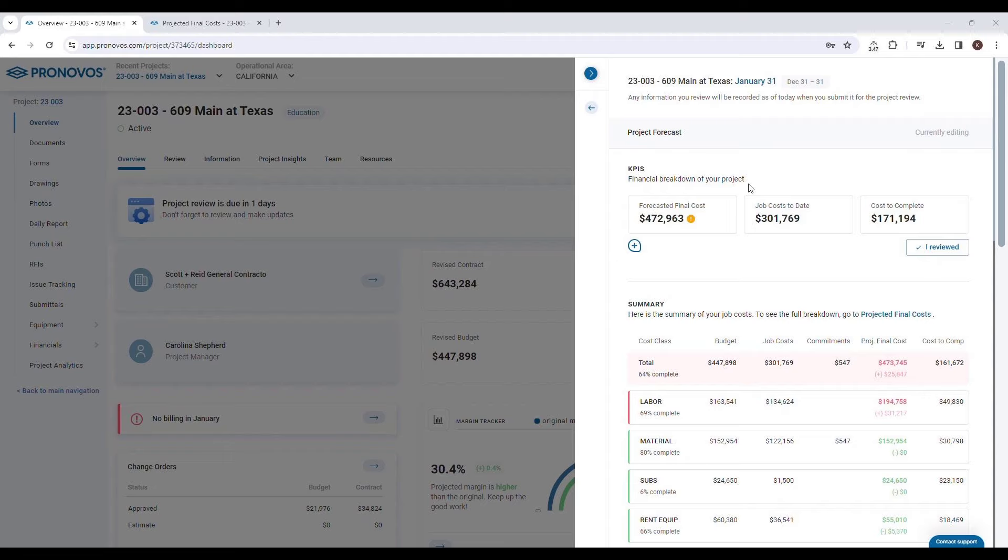Pronovos goes a step further by allowing you to compare the forecasted final cost with the current job costs to date. This comparison provides a clear picture of the remaining costs to complete the project, enabling you to plan and allocate resources more effectively.